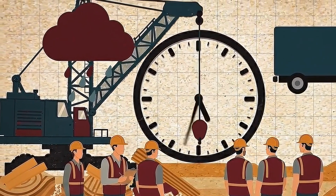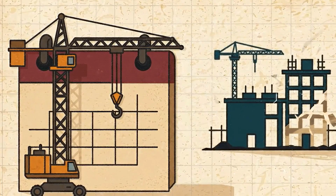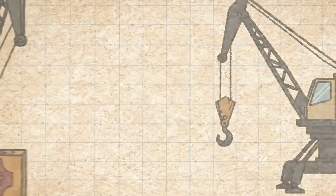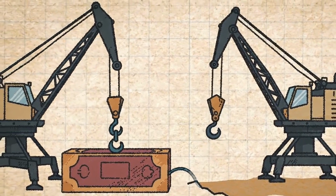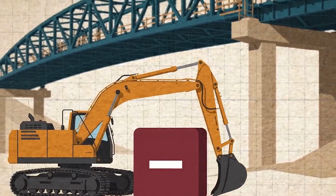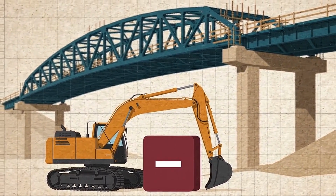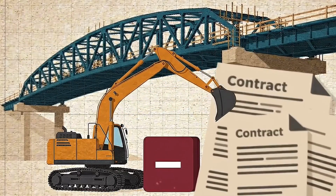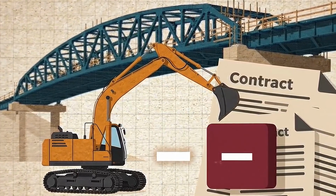In another ALL project in West Virginia, the company said a crawler alternative would have required more site work, more time, and 20 additional truckloads. The point is not that one machine type always beats another. It is that the customer may be choosing between different project paths, each carrying its own site and logistics burden. Again, that is the contractor's comparison, but it reveals what the customer is comparing, not crane versus crane. Crane plus logistics plus schedule versus another way of building the project.